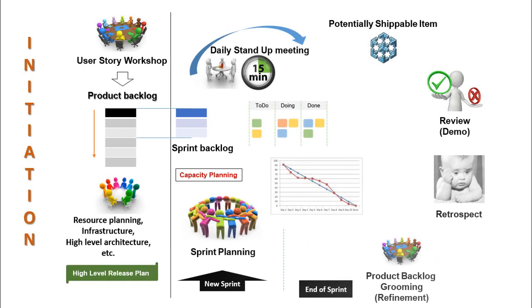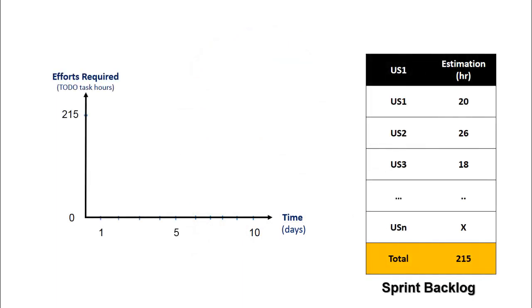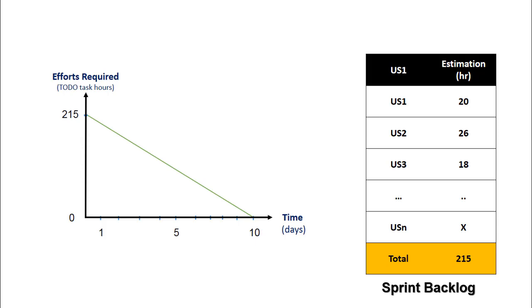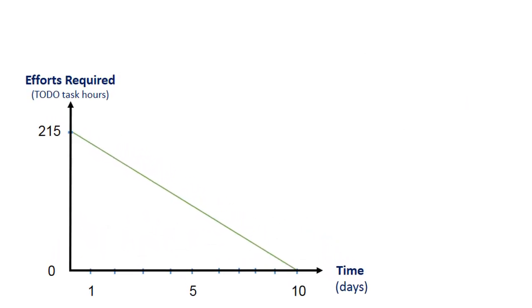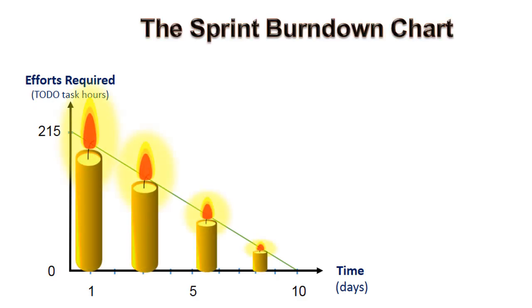Now I am going to discuss about the daily scrum meeting, the Kanban board and the sprint burndown chart. Let us draw a graph based on the sprint backlog efforts required versus available time in the sprint in terms of number of days. At the beginning of the development the required effort hours for the completion of sprint backlog are 215. If everything goes fine then the remaining work hours will be zero on the last day of the sprint. So let us draw a line joining these two points. Theoretically the remaining work hours for every day will fall on this line. This looks like a candle of remaining work burning down, hence it is called a burndown chart, and this straight line is called the ideal sprint burndown chart.